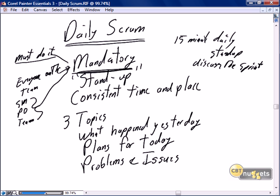Obviously if a person is on vacation or sick, they are excused from the daily scrum. But there are no excuses such as being really busy on a particular module, focused on a user story, or in the middle of testing. None of those excuses are acceptable. The daily scrum is a mandatory part of being a scrum project.